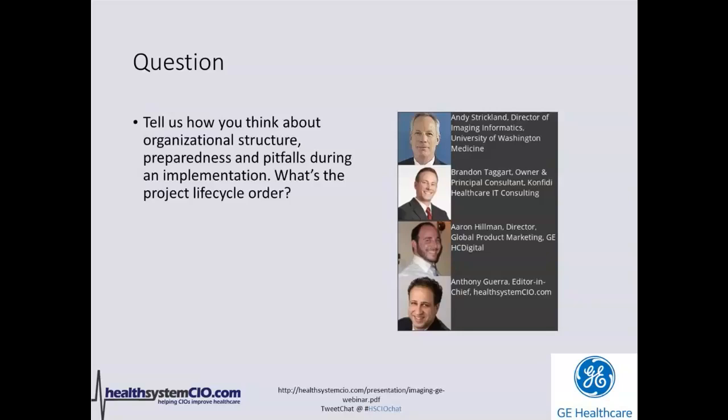Then you're moving into your RFP or your RFI, depending on time constraints. Contract negotiations, which are key. Never shortchange yourself on contract negotiations. Make sure everything has been line itemed. And then moving into your implementation.